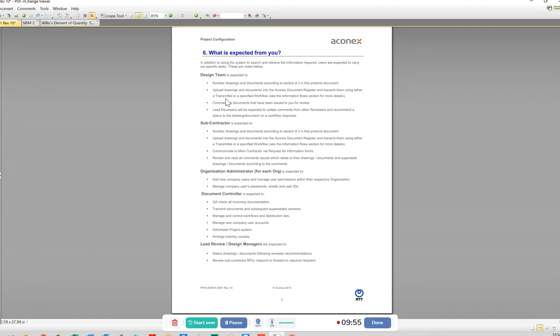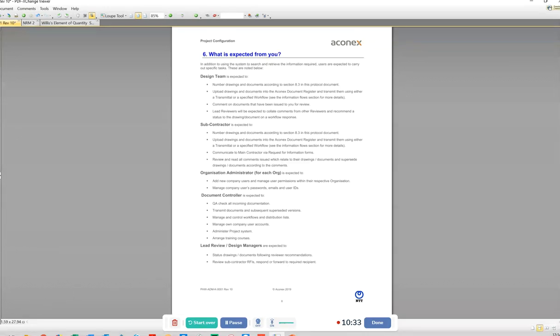that's the contractual way or process to actually request or ask questions, technical questions about maybe certain elements on the drawing, or what is supposed to be here, you know, gray areas where you don't have complete information. And it's actually your responsibility to use this process or the different processes that are available to you. And so that's what this section actually gives us, so that everybody knows what they're actually supposed to do and how they're supposed to go about it. And so we go to the next page.